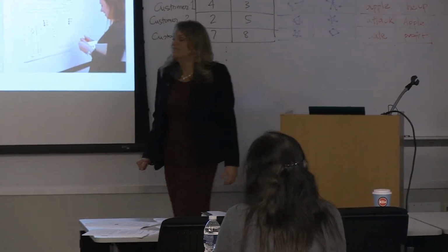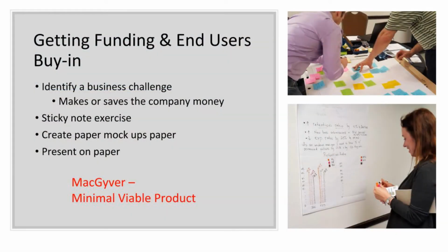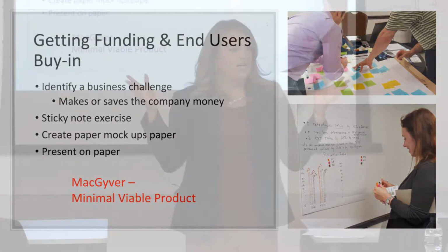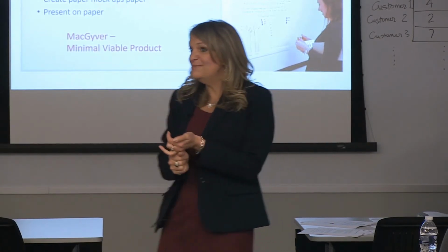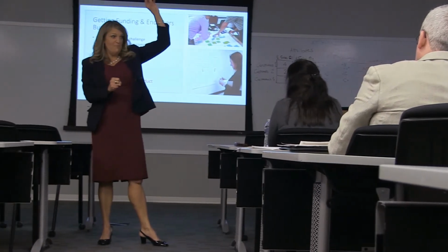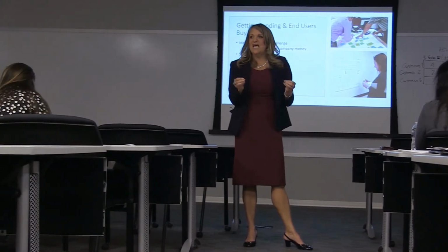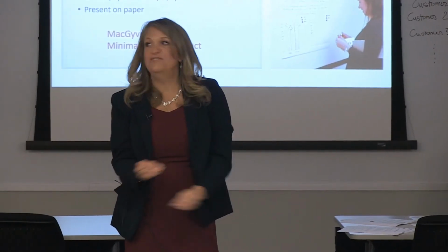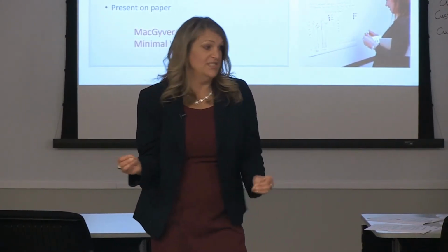So the MacGyver approach. The MacGyver approach is you're going to take all these ideas, and then as an organization or as a team, you're going to identify, whoops, I almost screwed up my little mic there. You're going to identify which idea, you're going to narrow it down to maybe 2 or 3 ideas that have the most viability, that will bring the biggest bang for the company, that have the resources, we showed the little grid, biggest opportunity for the organization, least amount of risk, that you can do in a shorter period of time. Executives need to see quick wins. They do not have the attention span for 3 to 5 year engagements before delivery.